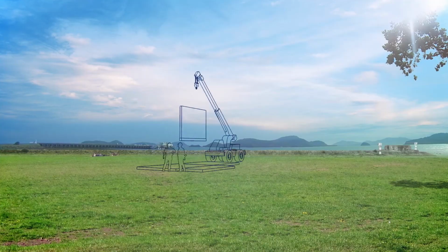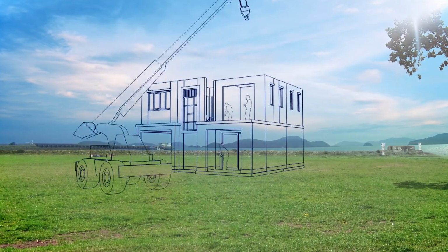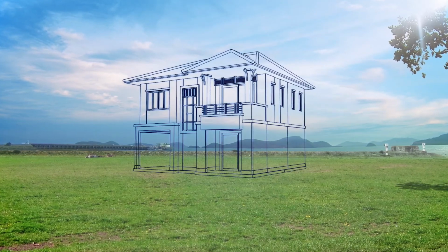Another trend we've seen among inexperienced ADU designers is that they underestimate the construction cost for these units. It's tempting to turn to an ADU in a case study full of cool ideas the designer has been trying out, but some of those ideas, like enormous windows or inventive roof lines or cladding every exterior wall in wood, are going to totally bust your budget.